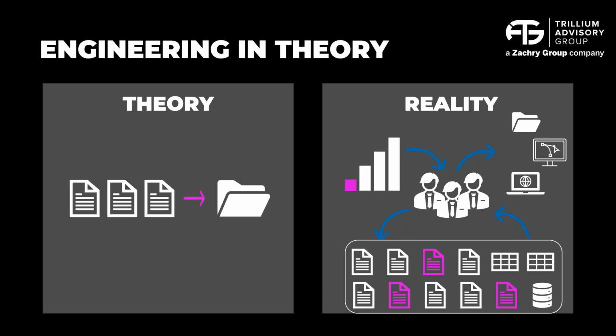And I know Joe's going to talk about some specifics, but one of the key things to keep in mind is really that front loading of resources in engineering is quite critical. A lot of teams really underestimate how early and how fast engineering needs to ramp up in order to support those downstream deliverables. So in theory, the concept of producing EWP seems quite straightforward. In reality, there's a lot of complexity here, and we need to get it right, because if we don't get engineering right, the downstream activities, certainly there's impacts there. And we've heard a lot of good content over the last couple of days around how to focus that effort on engineering, what's required for data. I know CII has done a lot of great work there as well. But it really is important that we focus attention on the holistic deliverables for engineering and not just that engineering work package.